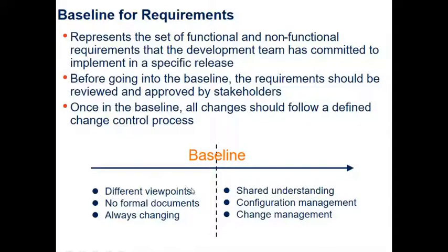And then at some point you have discussed with the stakeholders and everybody has agreed on the requirements. When everyone has reviewed and approved the requirements, that is when you take a snapshot of that document, your requirements, and that becomes the baseline. Any change afterwards needs to go through the change management process. From that moment onwards, everybody has a shared understanding of the system. You no longer have different viewpoints. Also configuration management has to be taken care of.